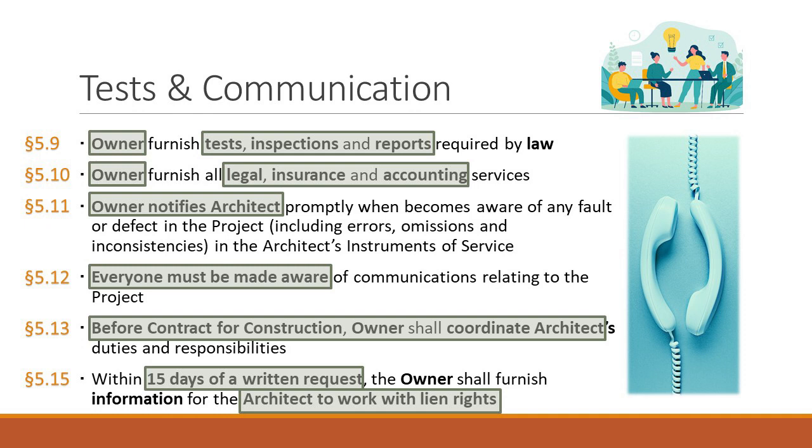Same thing happens on the construction side. Since there's no contract between the electrical engineer and the owner, they can never bring that lawsuit. It doesn't seem fair because the owner's enjoying the benefit. Same thing on the construction side. There's no contract between the plumber and the owner, so they can't bring a contractual lawsuit, so they have these lien rights.